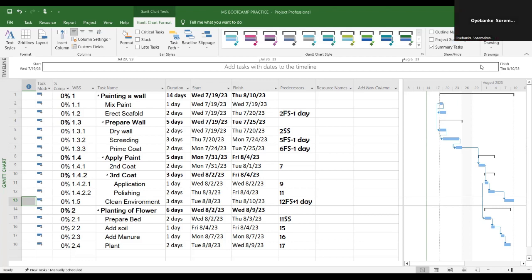Very correct. Good. Because that is the document that will actually break down complex parts of the project that you can't see with a physical eye. If you watch my YouTube video on estimation technique, what I say there is, when you are handling WBS, keep breaking down all your subtasks to the lowest form of the work package. The lowest form is the place you get to where you can easily allocate time and cost without being ambiguous. If you get to any point where the ambiguity is high, it means that activity should be further broken down.